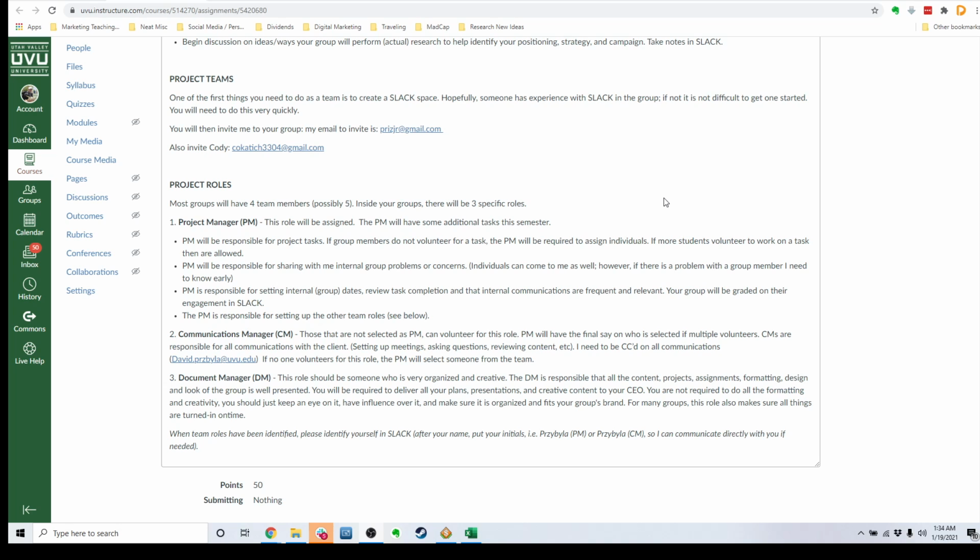The project management role, as I've mentioned in previous videos, is leading as what I could call a servant leader, someone who helps make sure things stay on task, organizes, and has a few other roles that they'll be communicating with myself or my graduate assistant. But I'd also like you to create the role of a communications manager. This individual is responsible for all communications with your client. Please identify someone in the group who will be very timely and is very forward about making sure communications happen. Your clients will need to be pushed at times to get responses back to you. That will be on your communications manager.